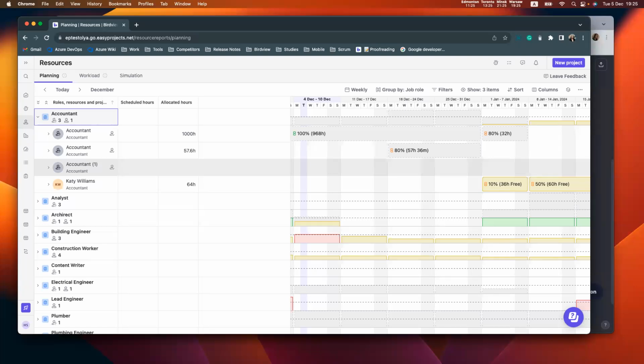Let's go. Awesome. One of the questions we have is to reiterate what the difference is between the scheduled and allocated hours. Yeah, perfect question. Thank you, Martha. Scheduled hours are hours which we usually set up in Activity Center, in tasks and activities. These are estimated hours, meaning that users are already assigned to specific tasks, and they most likely will work on these tasks. They are scheduled, they are booked 100%.